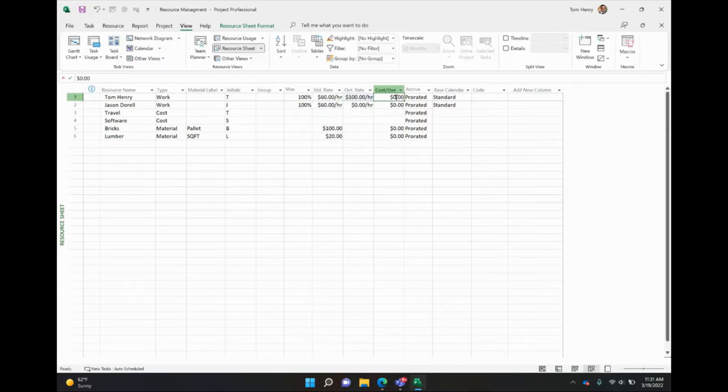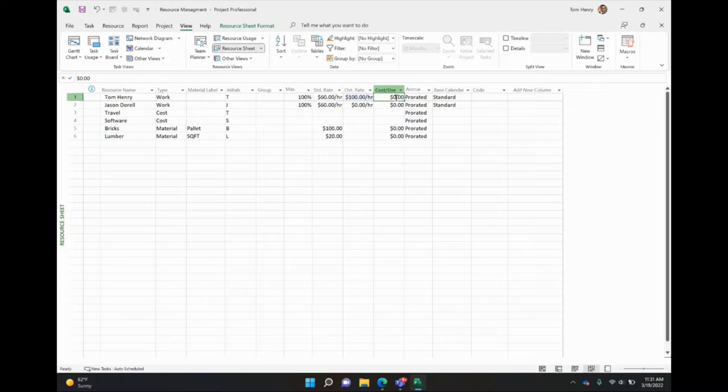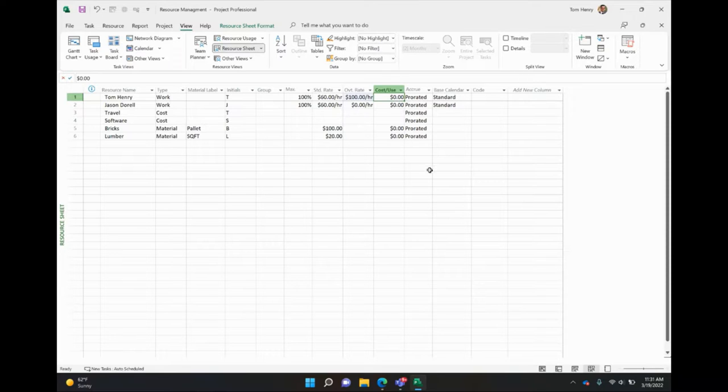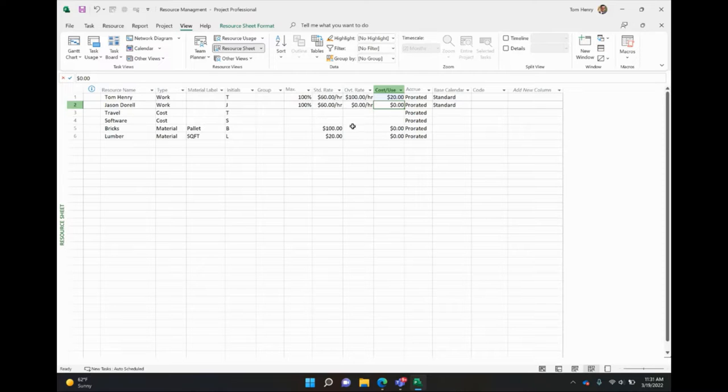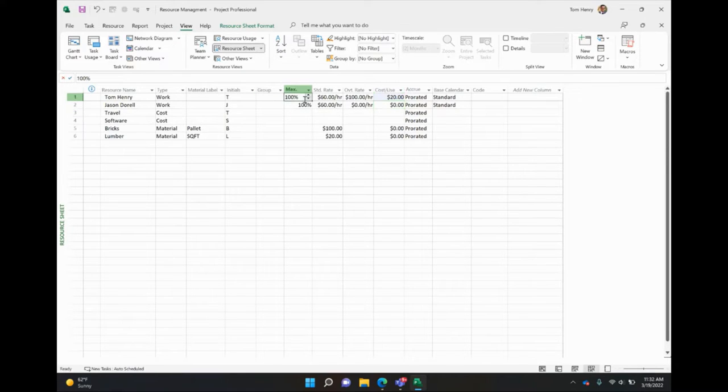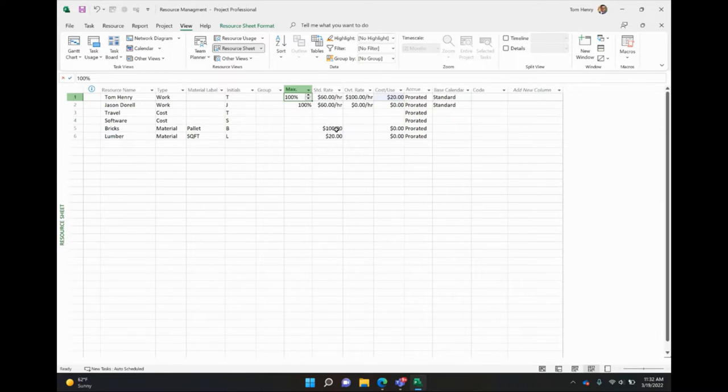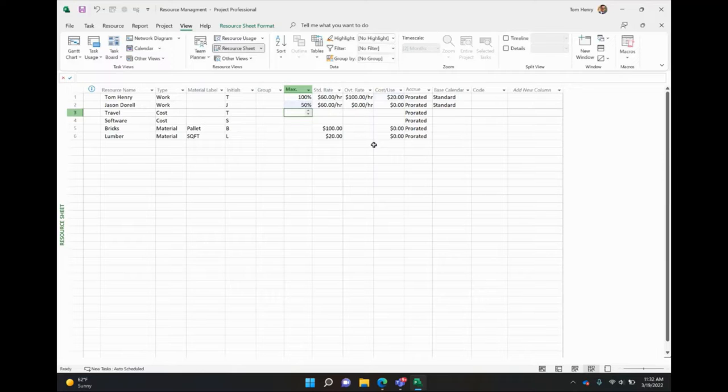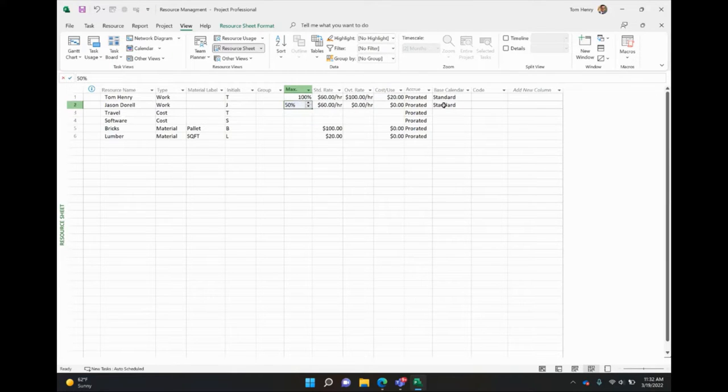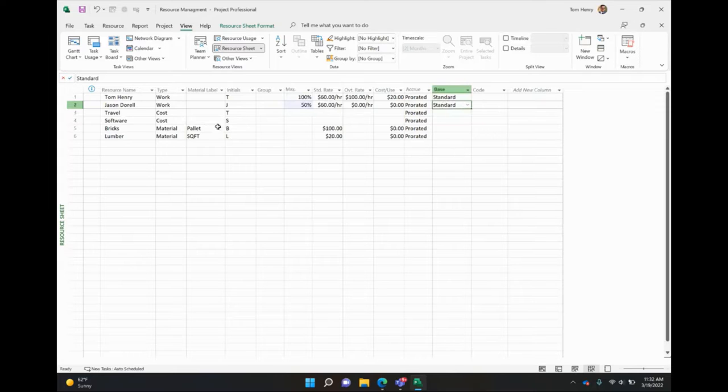Cost per use. So every time you use this resource, maybe there's a call outfit. If it's 20 bucks an hour, plus $100 every time you use them on a particular task, you can do that as well. Maybe we'll say, Tom Henry charges us $20 call out fee for gas, because gas prices right now in 2022 are pretty high. We can also set the max units for a particular resource. This is the percentage they generally work on the tasks within your project. So if you have someone that's a part-time resource, say Jason is part-time, he only works four hours a day, Monday through Friday. So 50% of his standard calendar, and you can create your own calendars. Let's move on.